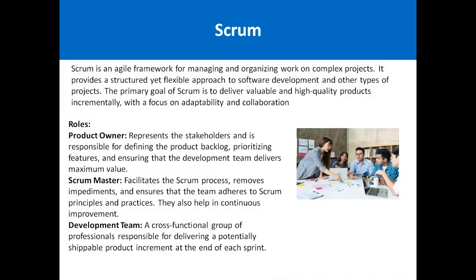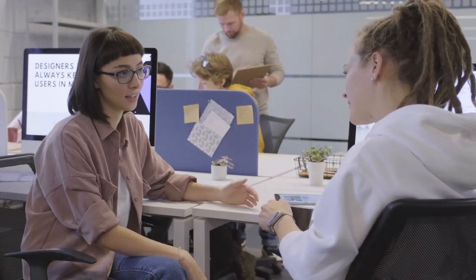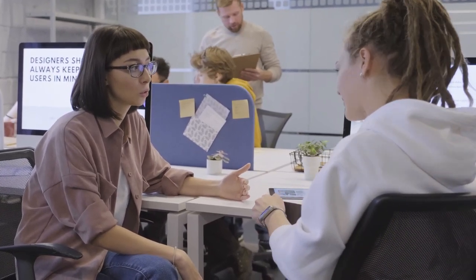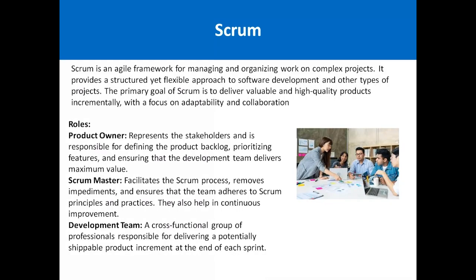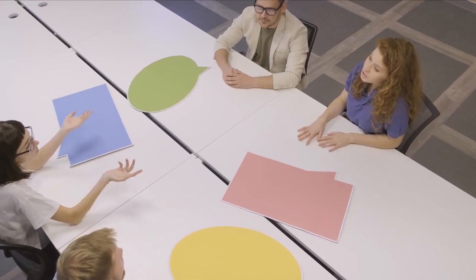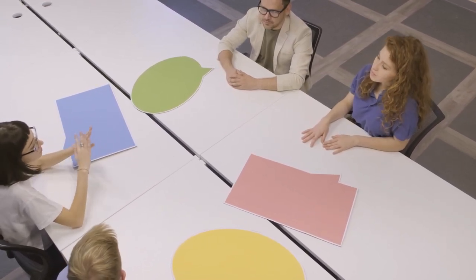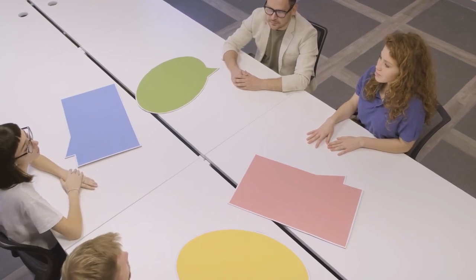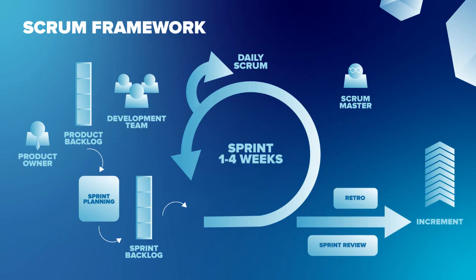Now in Scrum, which is based on the incremental or agile approach, what we do is divide the 40 tasks, for example, into 4 chunks, which are called sprints. Each sprint is focused on 10 tasks. So if there are 40 tasks, it will become 4 chunks, and for each chunk we will do the planning, development, testing, and deployment. When we reach the fourth chunk, the whole project will be completed, and the adaptability and the collaboration with the customer is very high.